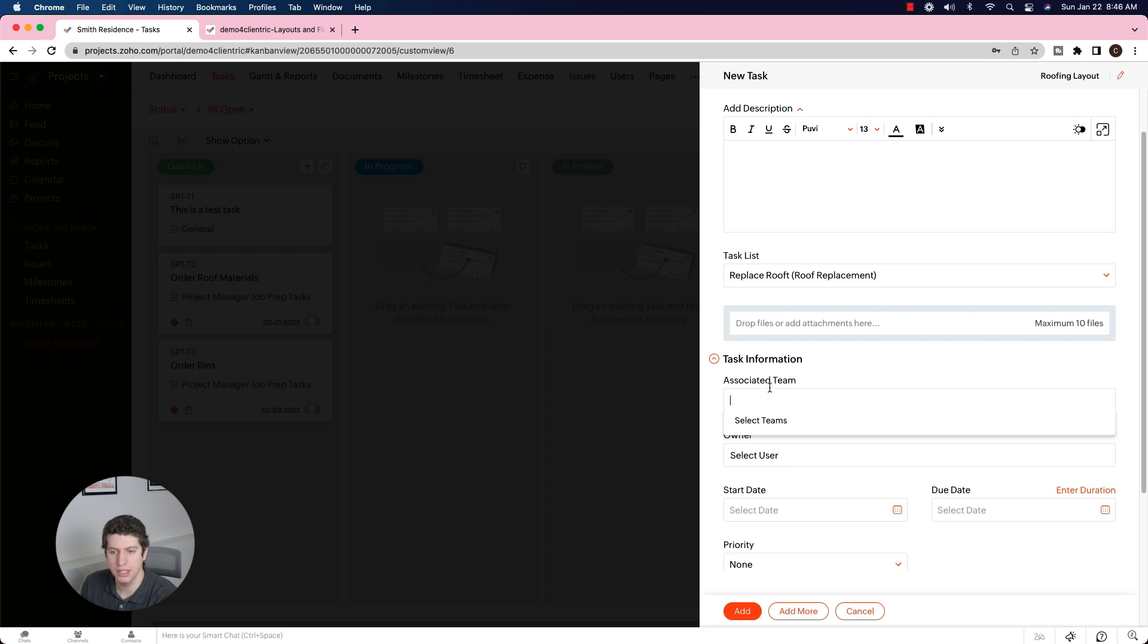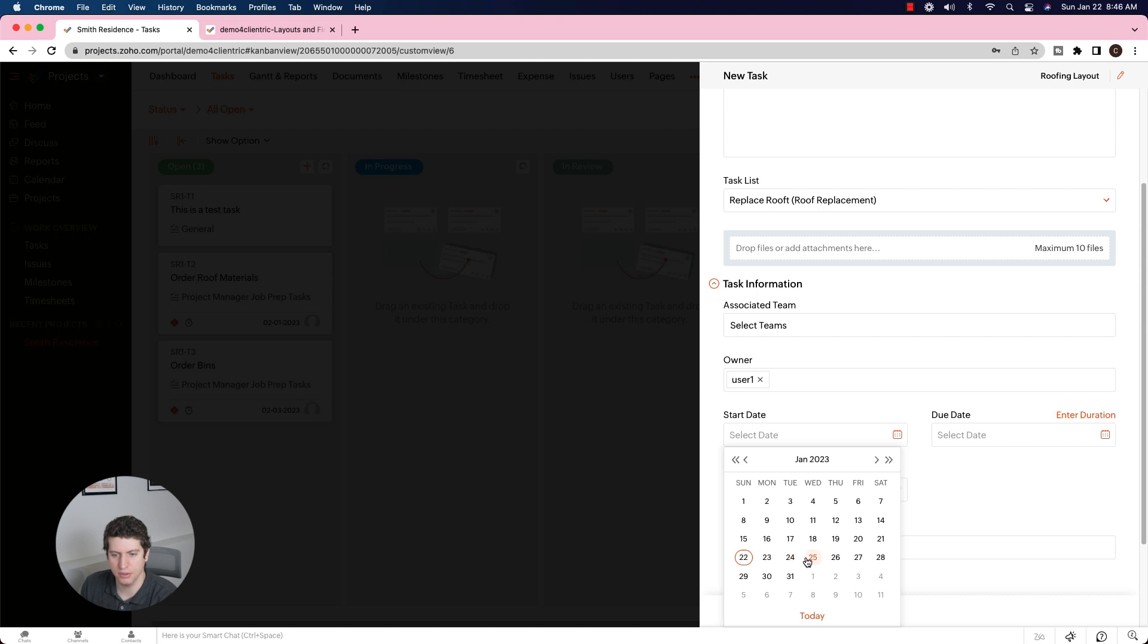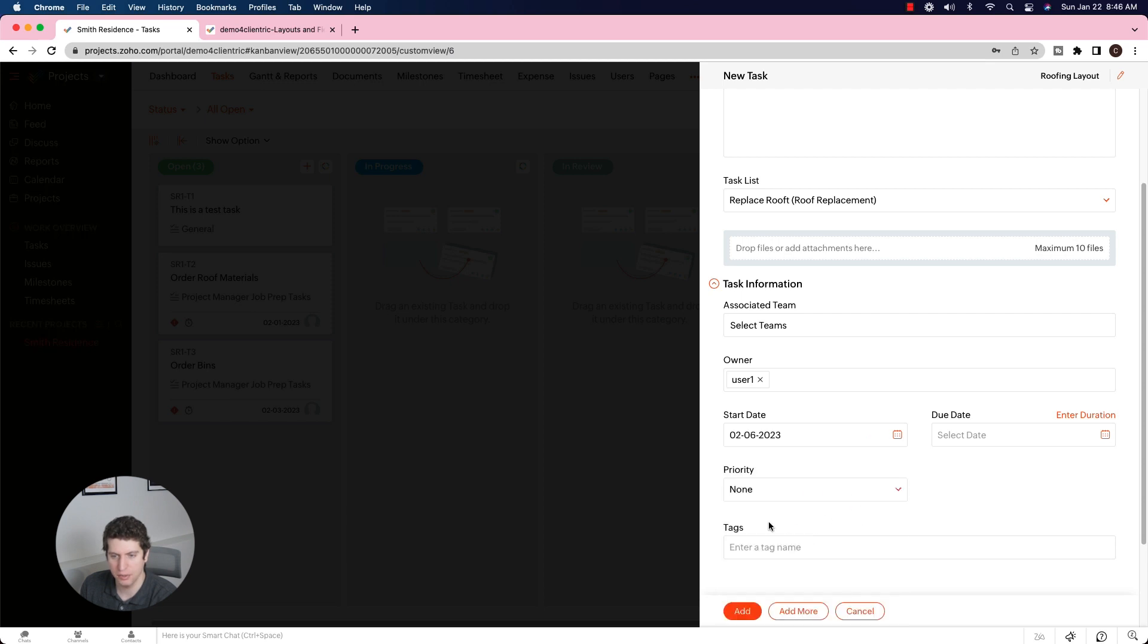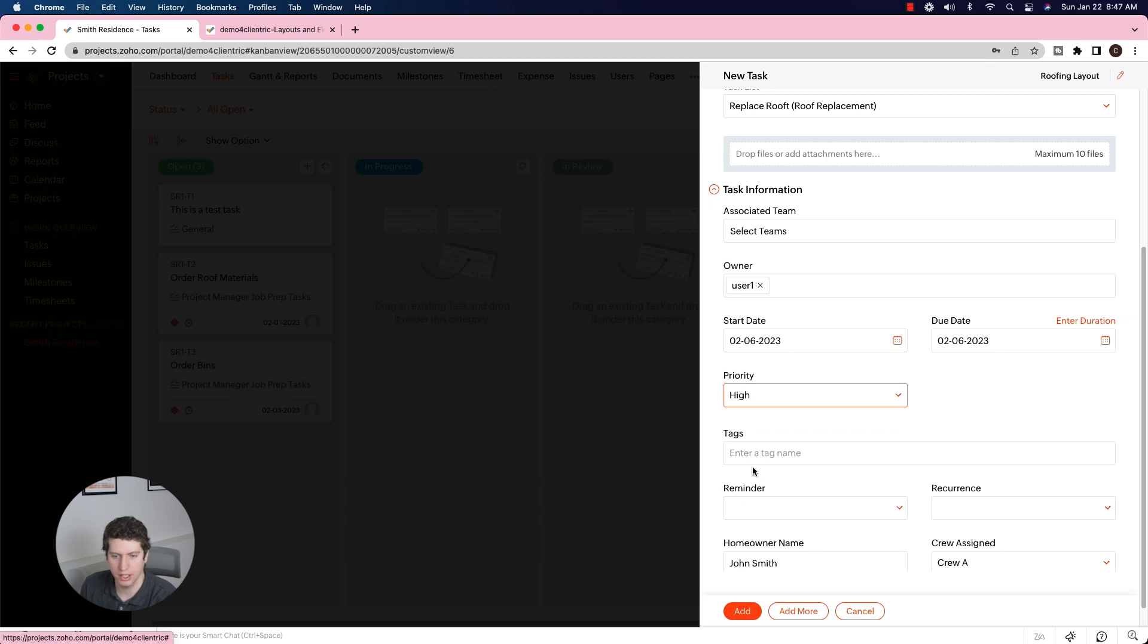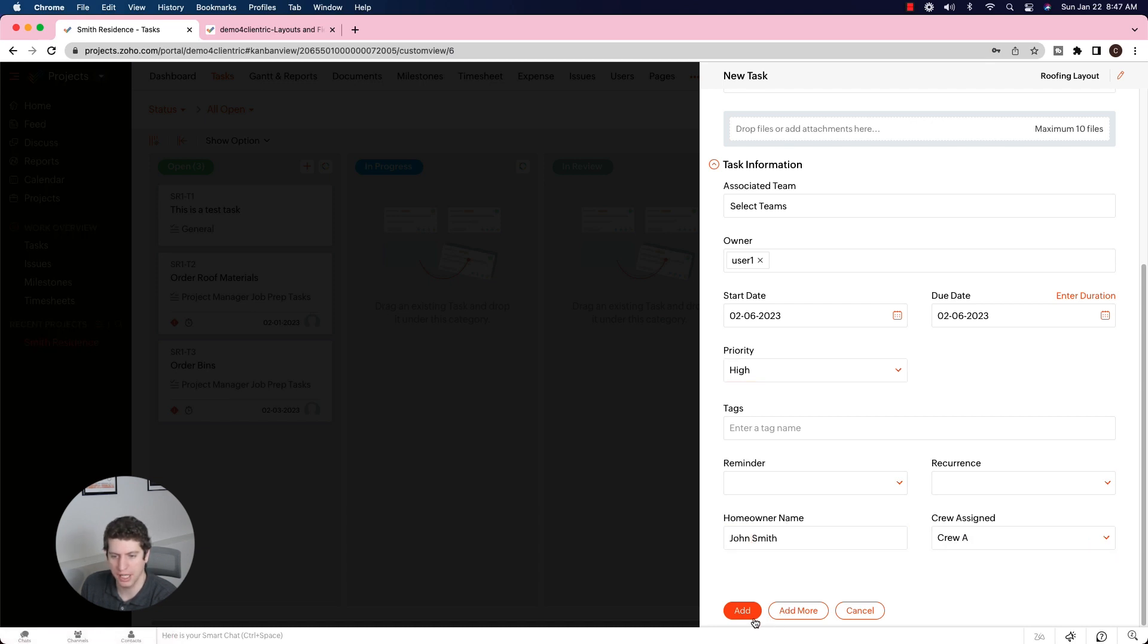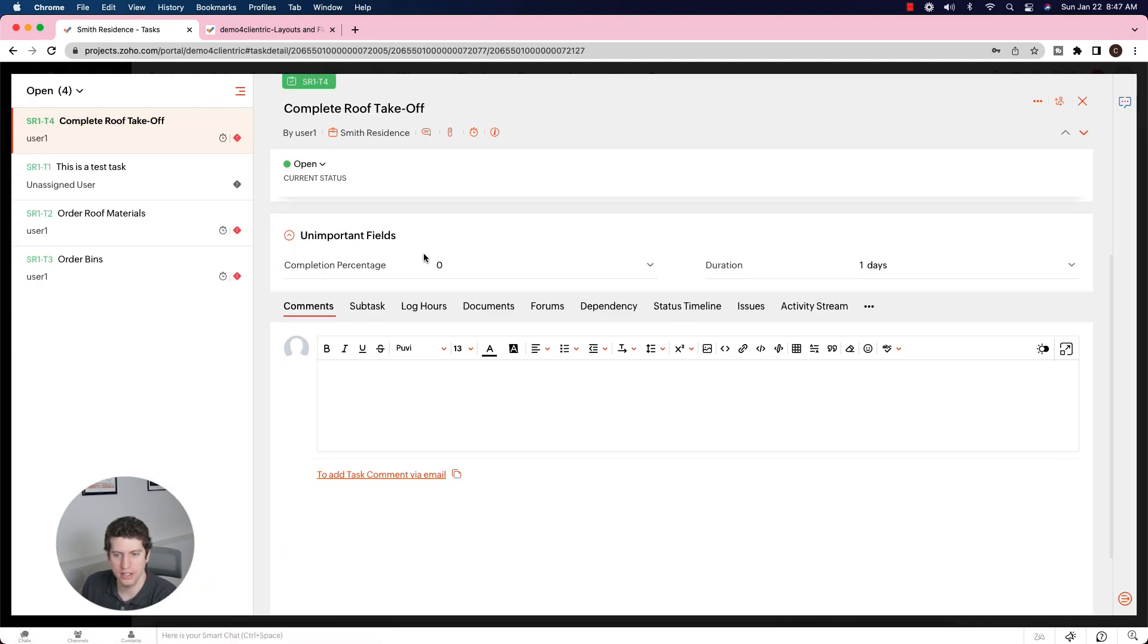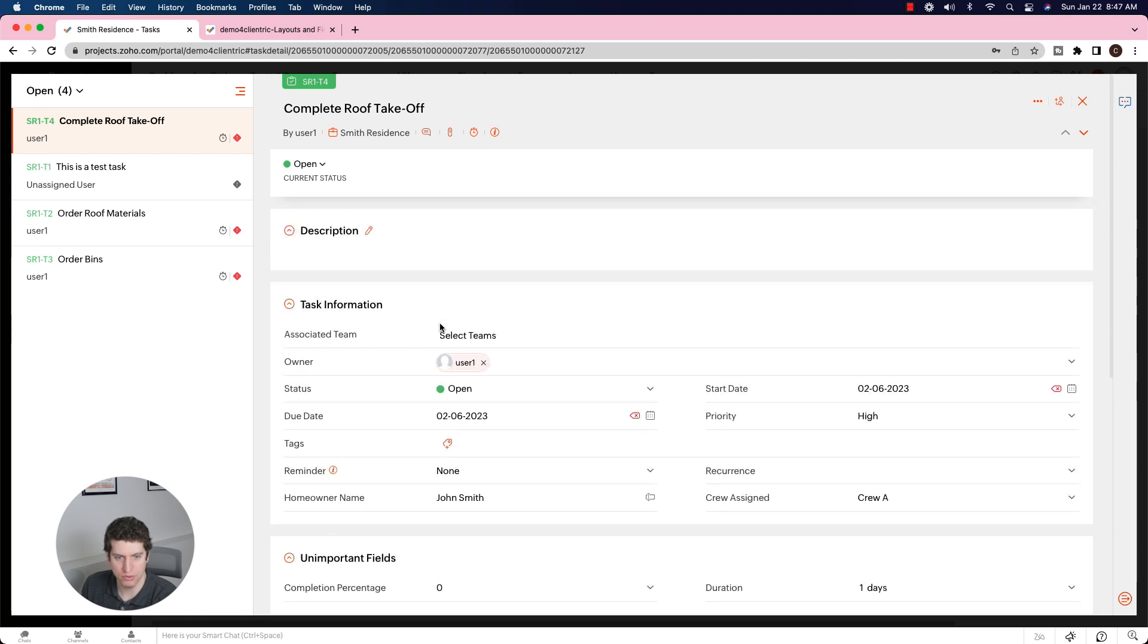You can also create teams. So your associated team could be crew A, crew B, crew C, crew D, etc. The owner is going to be the crew leader. Start date is going to be - let's say we're going to start on the Monday and we're going to say that February 6, everything's going to be completed. This has to be done before anything else can be done. We have the reminders or recurrences if we want to use those, the homeowner name labeled as John Smith and the crew assigned as crew A. And we have the unimportant fields here as well if you didn't want to take a look at those. So that is where that section shows up.